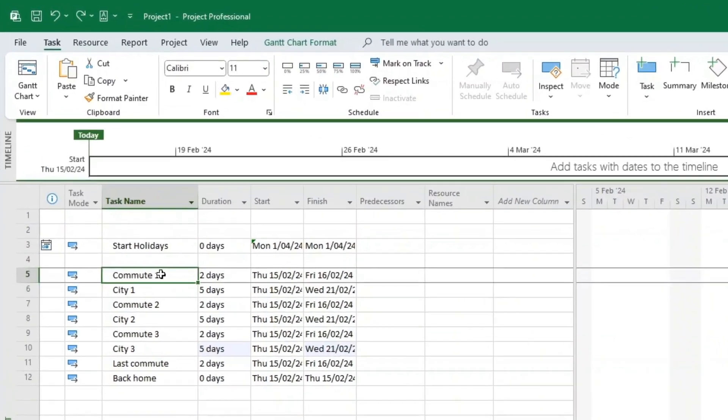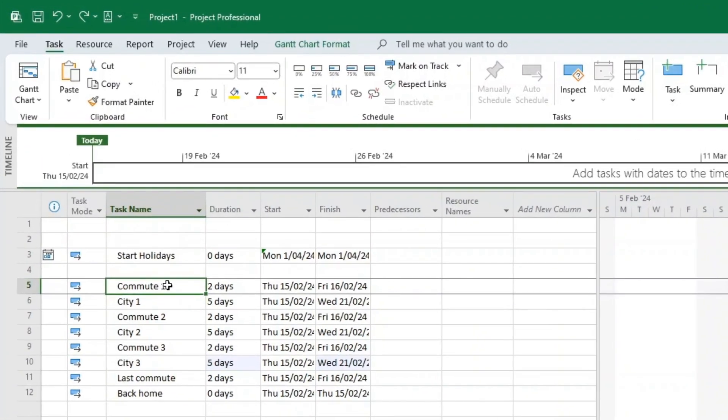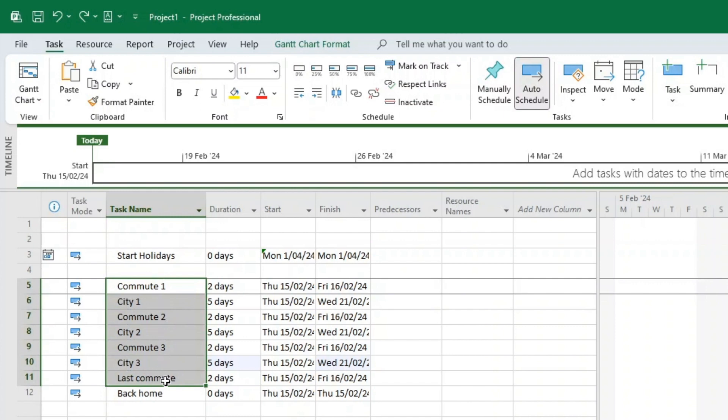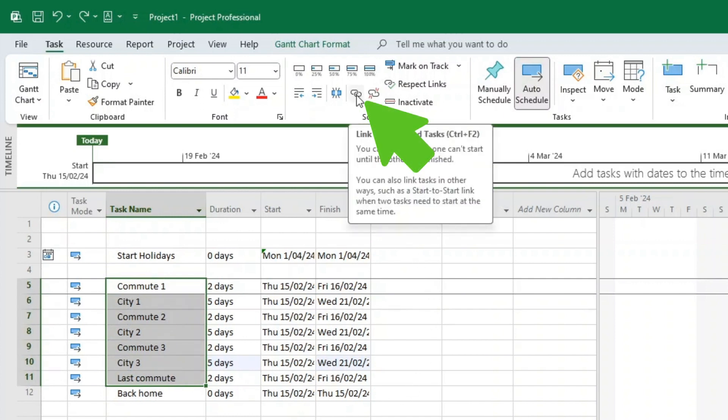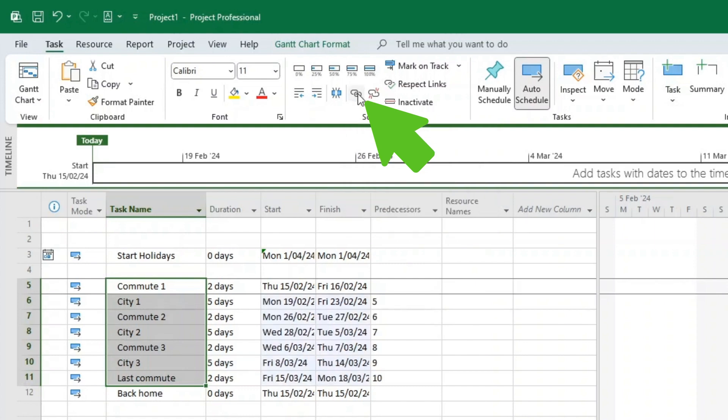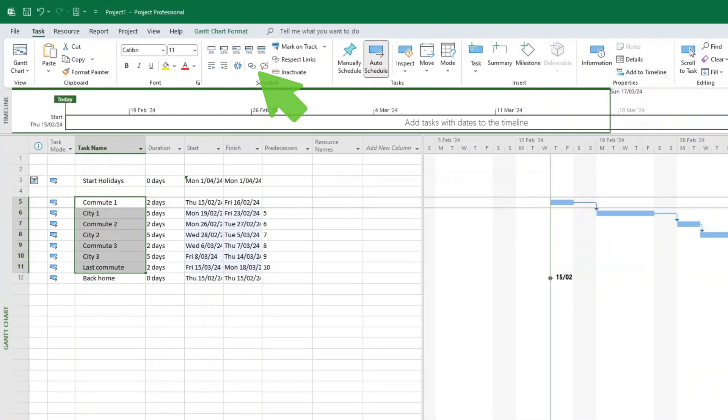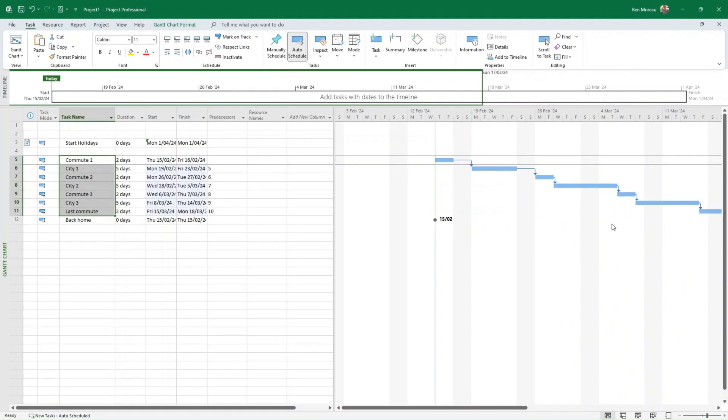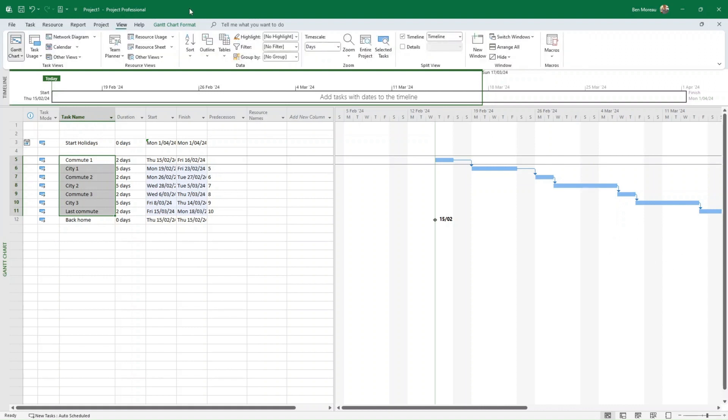So there's a very simple way to link tasks in MS Project: by just pressing and just dragging the mouse we select them all. And then we go to this symbol here at the top under the schedule - there is this link symbol here - and you just click on it. And look at that, it just shows you all the tasks.